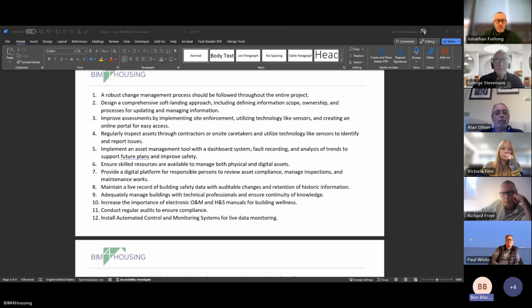So they're not really taking on any additional liability because the trade contractor has implemented in line with the architect's specification, and then any changes that were necessary, the architect should incorporate those. Otherwise, in 10 years' time, someone could open that architect's drawing and think that that's what was built, and it's not.